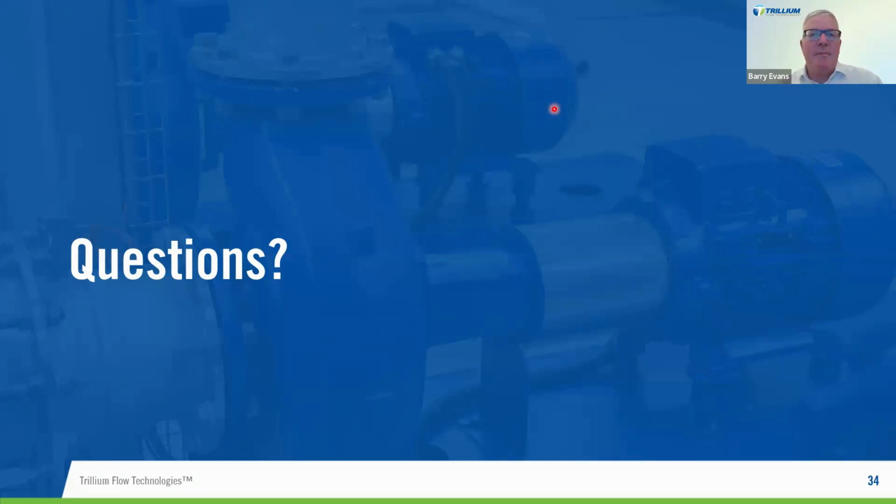There was another question that came up just now for the UK North Sea case study, about the variable speed drive, and why wasn't there a variable speed drive fitted? And the reason is there was no space available on the platform itself. We had to keep the physical limitations of the existing control gear so that the focus turned to the pump itself. And of course, if you start changing any significant weights on a platform, it does affect the original design case. By focusing on the pump, it meant that some of the other parameters didn't have to be addressed in an engineering change management application.